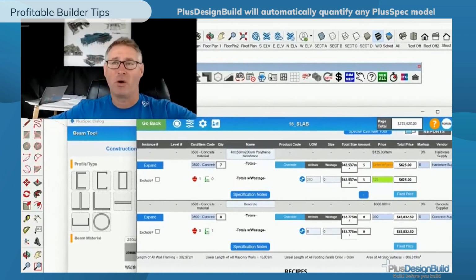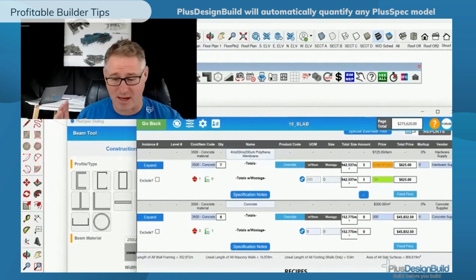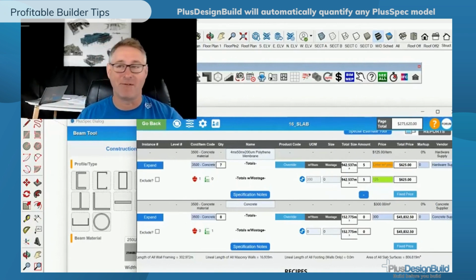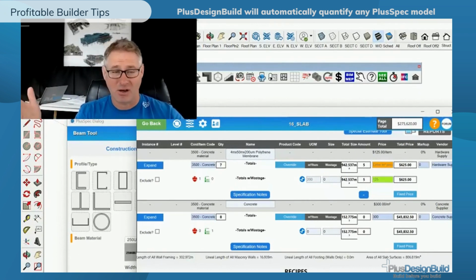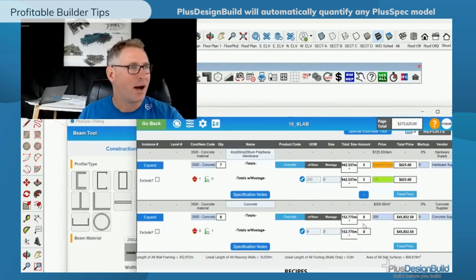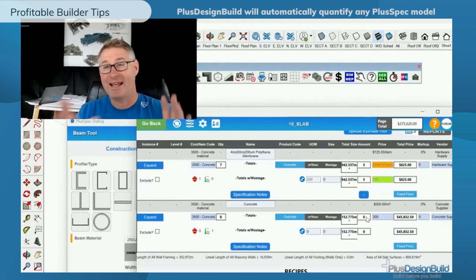People who work on square meter areas of floor plans to give indicative quotes are eventually, one day, going to have to do it if that indicative quote goes back to the designer and the client says, yeah, let's build it. It's one time at one stage of the job they're going to have to figure out how much concrete is in that, and someone's going to actually order it. It doesn't make sense if the designer's designing it not to know at the start of the job and say, well, at the moment I've allowed for 152 cubic meters of concrete in the initial plan. If the plans come back and there's 200 cubes or 100 cubes, obviously it justifies why the price is changing.